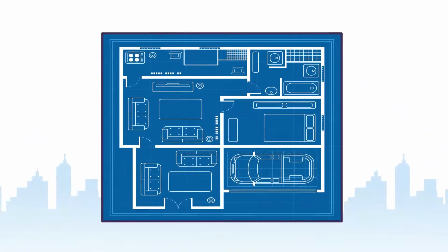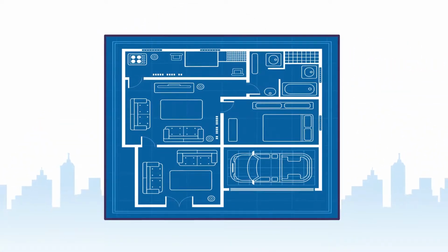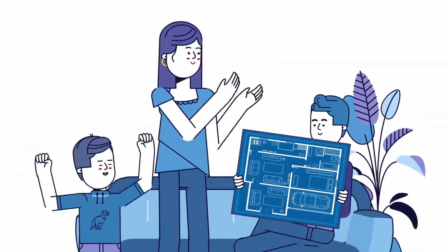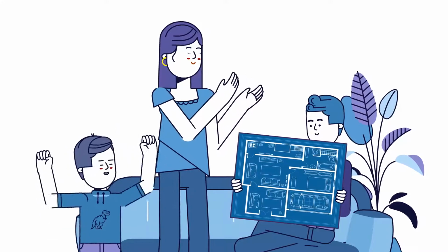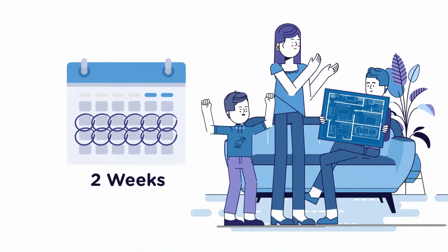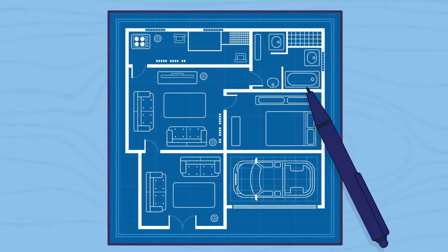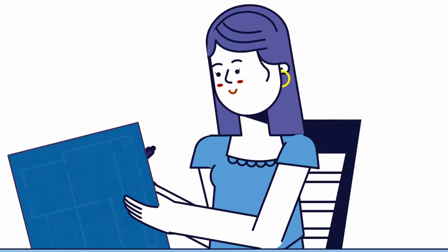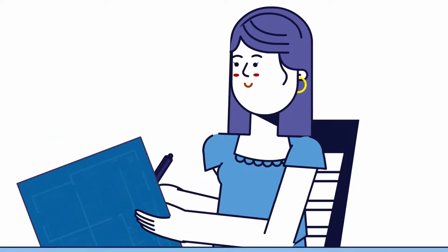These plans will show you all of the items included in your tender. This will be the first time you see detailed plans and be able to see how your dream home will come to life. Preliminary plans will take approximately 2 weeks to arrive. Getting your first set of preliminary plans is very exciting. Please ensure you review every detail and that we have captured your vision perfectly.